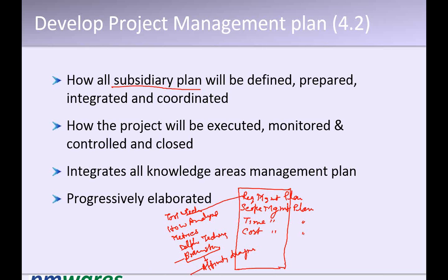Then I can say, okay, total time to gather the requirements, total time to document the requirements, time to approve the requirements. That becomes a metric. So you have to gather those metrics. Everything has to be written in requirements, similarly in scope. Similarly time: the unit of measure is days, not weeks or hours. Cost: the unit, the deviation is -5% to 0%. So no positive variance is accepted in the schedule variance. So this threshold also has to be defined.